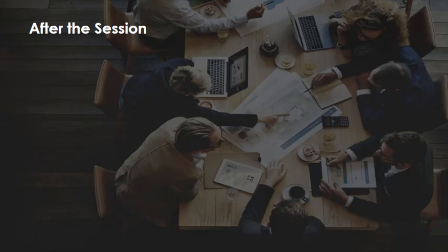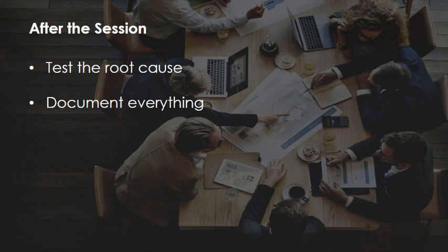Here are some tips for after the session or sessions are completed. First, test the root cause. Ask, if we fix this, will the problem stop recurring? If the answer is yes and the team agrees, you found it. Document everything and save the information in case the problem resurfaces or a similar issue is realized somewhere else. Record the full analysis chain, supporting evidence, and any branches explored. This creates a record for people who weren't there and helps track whether your root cause was correct.